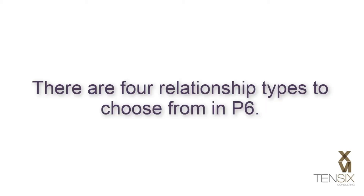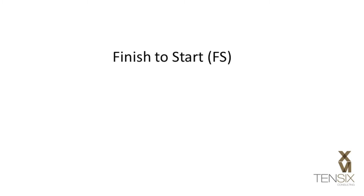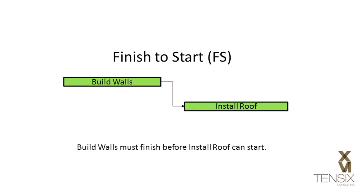There are four relationship types to choose from in P6. The first is Finish to Start, which is the most commonly used relationship. In this example, when 'build walls' is finished, then 'install roof' can start.